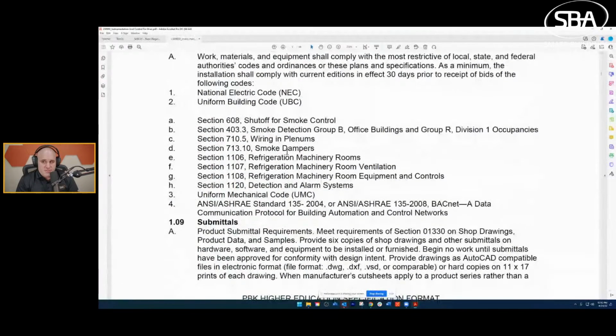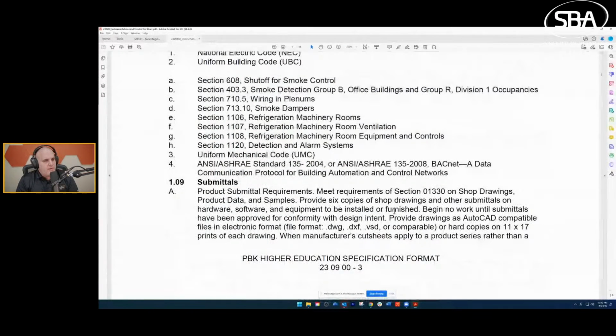Now we get to submittals. So this is the first opportunity for you to start revenuing business. And I've talked about this a lot in our project management podcasts and courses, where you need to think of your project as its own profit and loss center, its own P&L. And your goal is to get that project cash flow positive as quick as possible. So you're drawing on the cash revenue from the project and not from the business, because then that frees the business's cash up in order to allow it to reinvest in marketing and sales efforts and growth efforts.